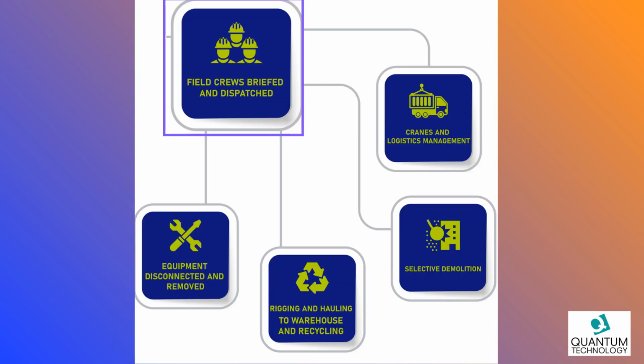Before arriving on site, we will have already identified what equipment we will need for all required decommissioning and demolition services. On day one, we'll arrive with our OSHA R2 and ISO certified crews, our foreman, a site-specific project manager, and vice president of project management. All personnel will complete a walkthrough of the facility and a briefing of all tasks that need to be done. Each morning, our on-site project manager will guide the crew through a safety meeting, pre-work stretches, and preparation for the day.